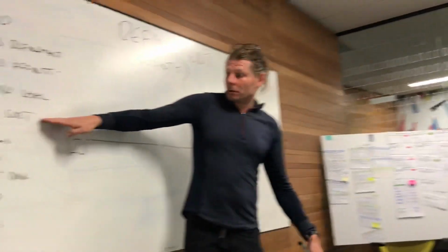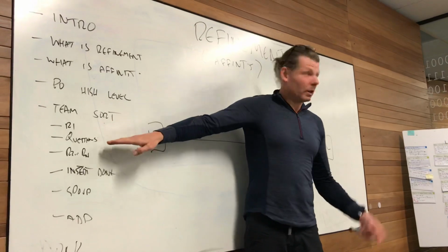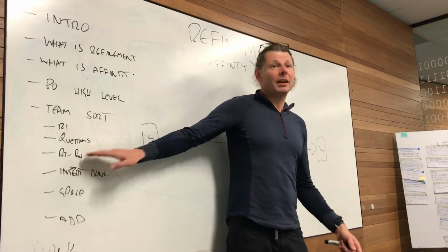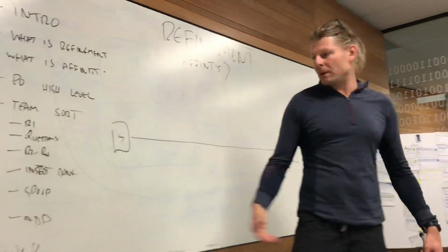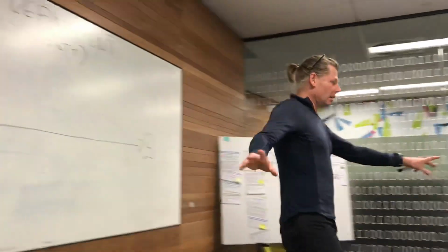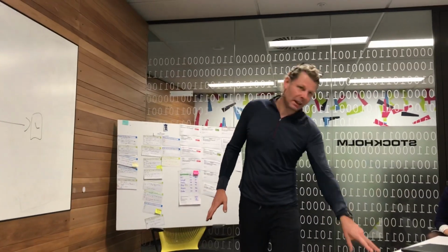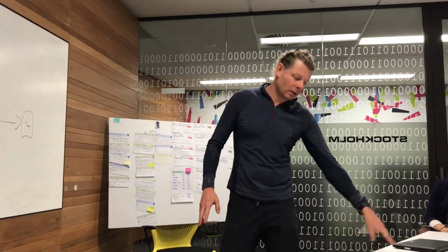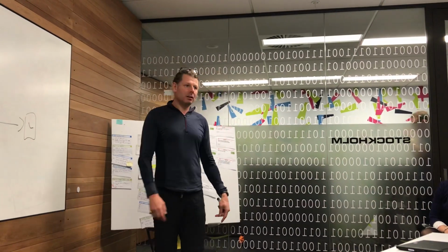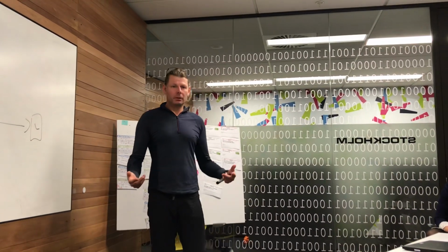So the team saw. So that's the first round, questions. The second round, questions again. And then as many rounds as it takes. You can do it in 2, maybe 3. Once we've done that, we should have then a line, and we should be satisfied that this story here is larger than this one and smaller than that one, and so on, all the way up. This is where the magic occurs. How do we apply real numbers to it?